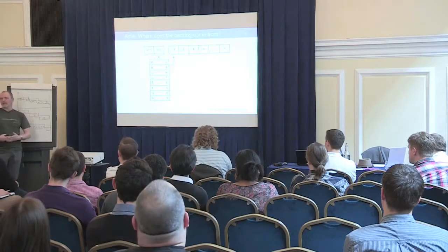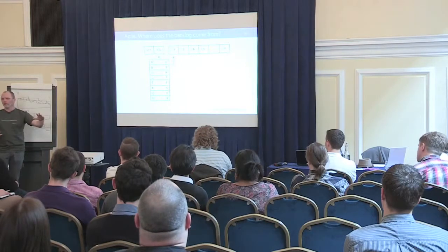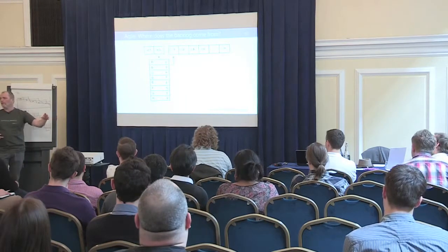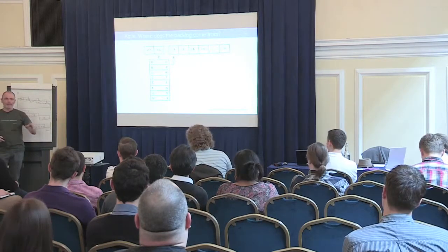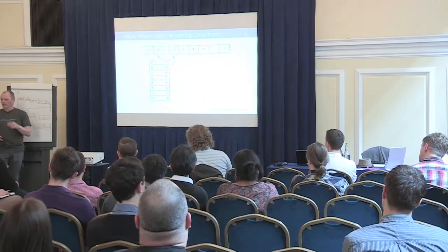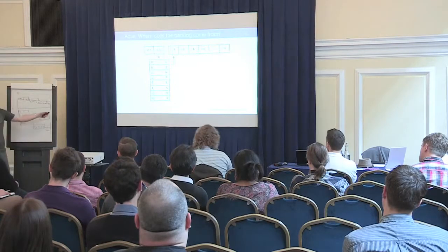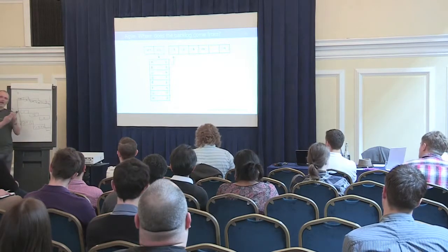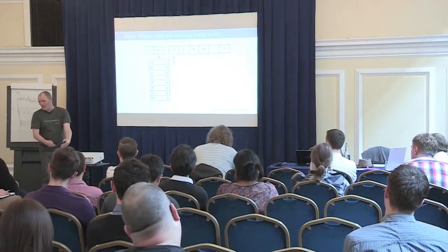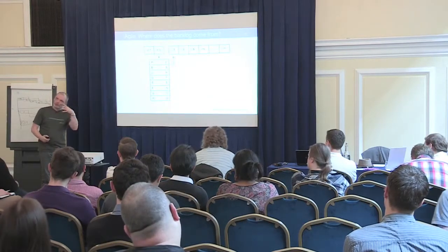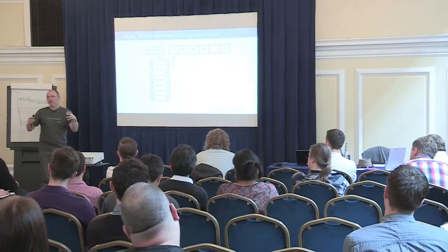And they did not set up an architecture. They just started building. And now, after a year and a half, the architecture does not meet this requirement. So they have to rethink everything they did. So it's a good idea to think about non-functional requirements, to think about a baseline architecture, to think about how to get the requirements out, although you do not want to run into the risk of doing the big upfront design.